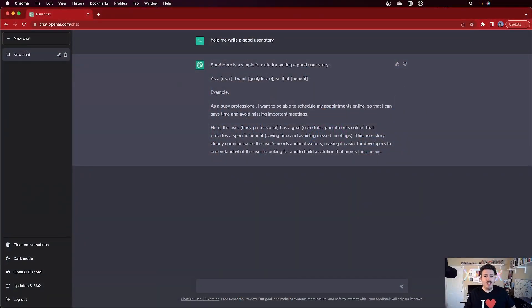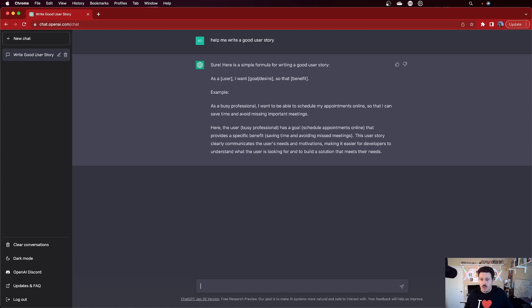So I asked it, 'Help me write a good user story,' and it said: 'Sure, here is a simple formula for writing a user story — as a [user], I want to [your goal/desire] so that [benefit].' Then it gives an example: 'As a busy professional, I want to be able to schedule my appointments online so that I can save time and avoid missing important things.' It explains the user, the goal, and the benefit, and notes that this clearly communicates the user's need and motivations, making it easier for developers to understand what to build. If you're a complete beginner, this is really good — it shows the structure, gives an example, and explains why it was written that way.